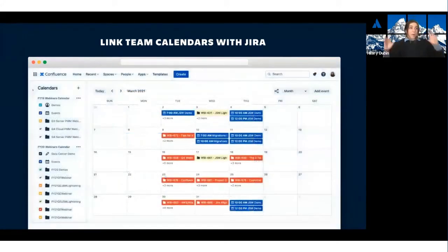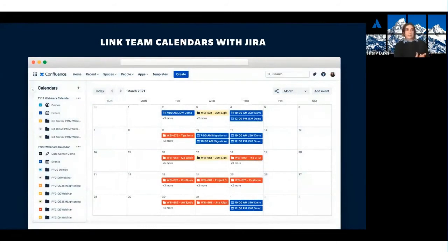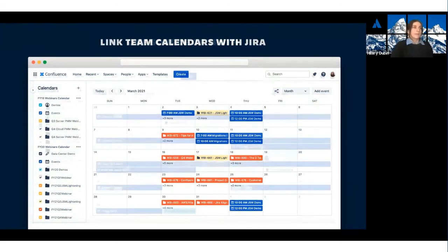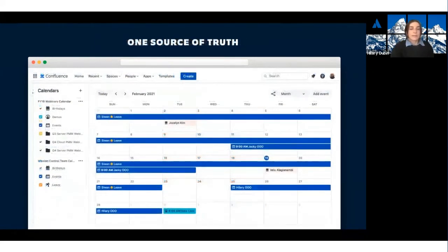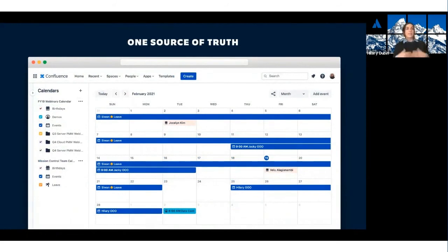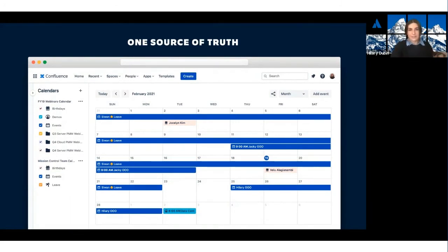Magically, all of the Jira issues from your JQL query become individual calendar events. From here, the team can see when various requests line up, and they can understand at a glance if they're overloaded or underloaded. When you overlay this with other calendars like Team Leave, you can get really the full picture for capacity planning with one source of truth across all of your different types of team calendars.